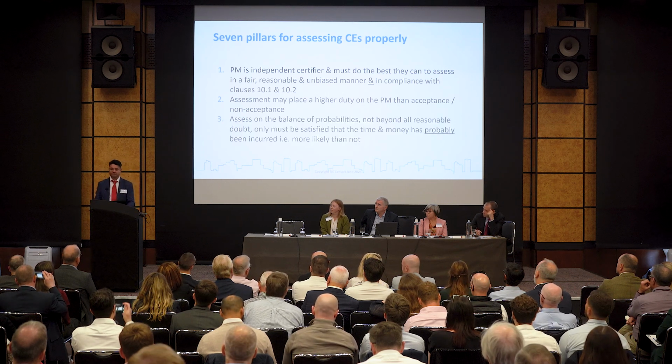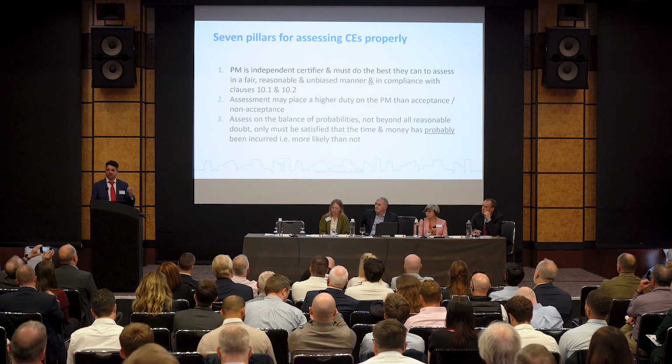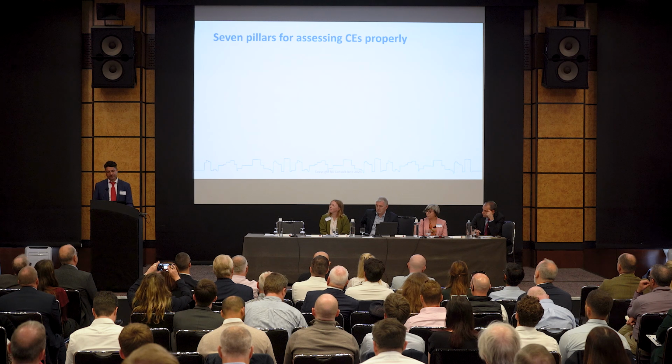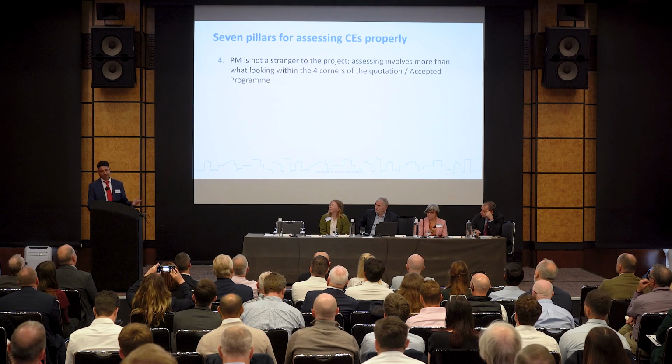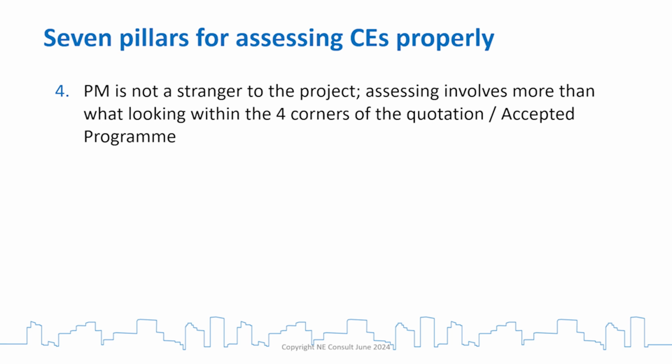The third pillar is, remember, we're assessing on the balance of probability, more likely than not that it was incurred. The fourth one, remember, not a stranger to the project. Don't stay within those four corners. You've got to look at all the information available to you to produce a fair and reasonable assessment. Because all too often when I see commercial people involved in compensation events, they act like they've just been born. I'm sorry, I'm new here.